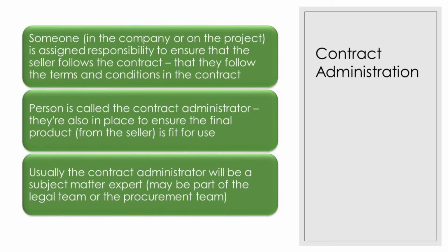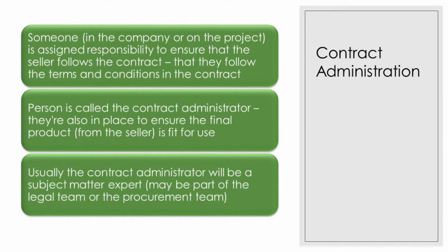And of course, contracts and agreements are legally binding documents. And we have to exert all the efforts to ensure that we don't go into legal issues or legal disputes. So when administering contracts, someone in the company or on the project team is assigned the responsibility of ensuring that the seller follows the contract and the contractual conditions, that they follow the terms and conditions in the contract. That person is called the contract administrator.